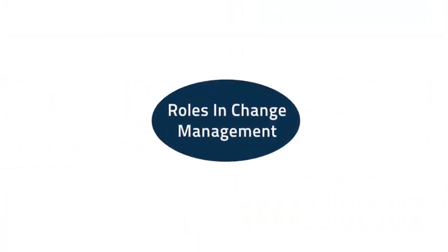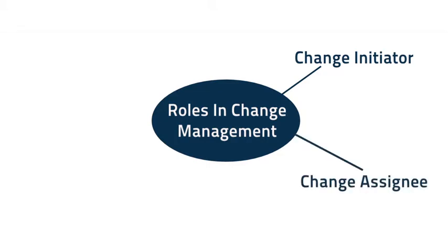The roles in change management are: Change initiator, the person entering the change request. Change initiator can also be the change assignee. Change assignee, the person actually implementing the changes, also responsible for entering resolution notes and actual start and end dates.